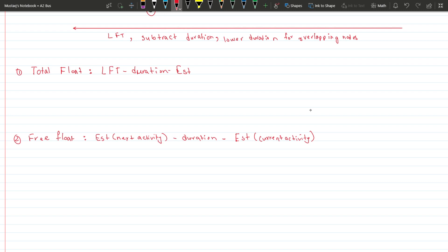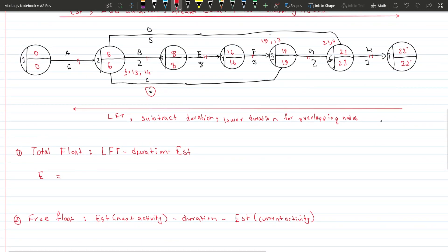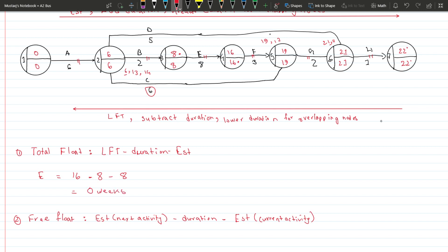Let's calculate the total float for activity E. The LFT for E is sixteen; we deduct E's duration of eight weeks; and the EST for E is eight. So: sixteen minus eight minus eight equals zero weeks. This means there is no spare time for E — if we delay E the whole project gets delayed. This confirms E is a critical activity with no idle time.